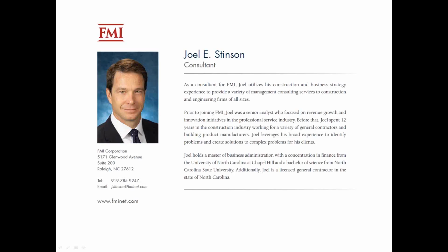Any advice on how to set caps? How do you address caps when the unexpected change order issues are needed, especially if they're on critical issues? So the first thing you need to understand is your own cash flow. How much money are we willing to put out there that if we don't get paid, it's not going to negatively impact our business?